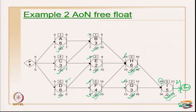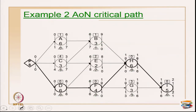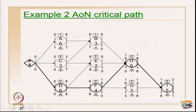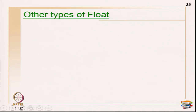The meaning of free float: for activity B, a free float of 1 means you can delay B by 1 day without affecting the early start of successor H. Total float of 1 for activity B means delaying B by 1 day will not delay the entire A-B-H-I path. That is why total float is called a path float and free float is called an activity float.